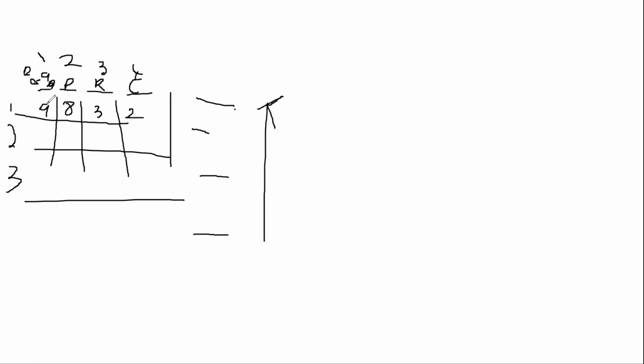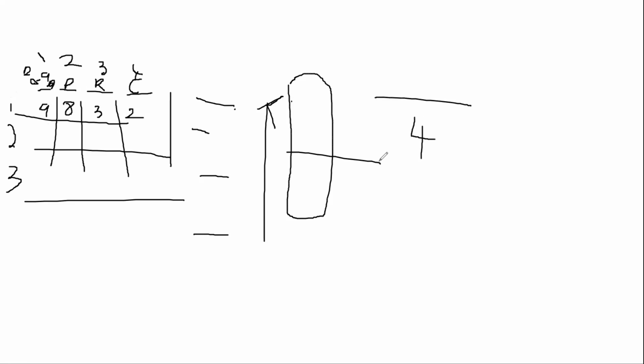In weighted average, you multiply 9 into 1, 8 into 2, 3 into 3, 2 into 4, and add them up and divide them by 4. That's weighted average. So once you get all the weighted averages, you reprioritize them, and you go from descending to ascending with the numbers, and you will get the top ones are very important and the bottom ones are not.